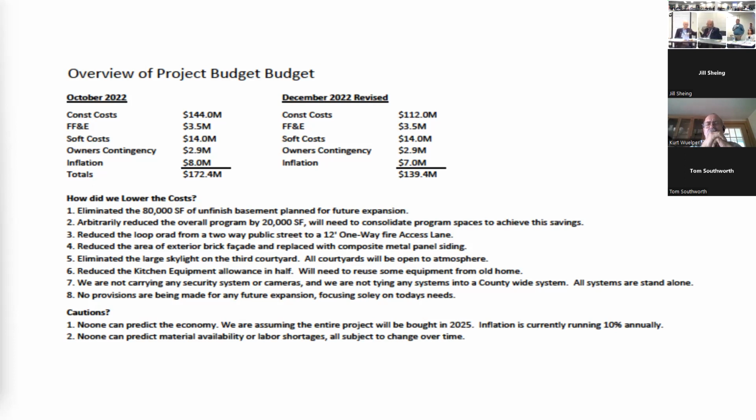If we decided to move forward, even if it was in steps, when you do the site work, at that time, could it be determined if geothermal is a possibility? Yes. We would probably do 2 test wells and we would do test pumping. Basically we draw the water out of the ground for 24 hours and we measure the other well. If the other well stays constant and we don't draw it down, we know we have the amount of water that we need to run the system.